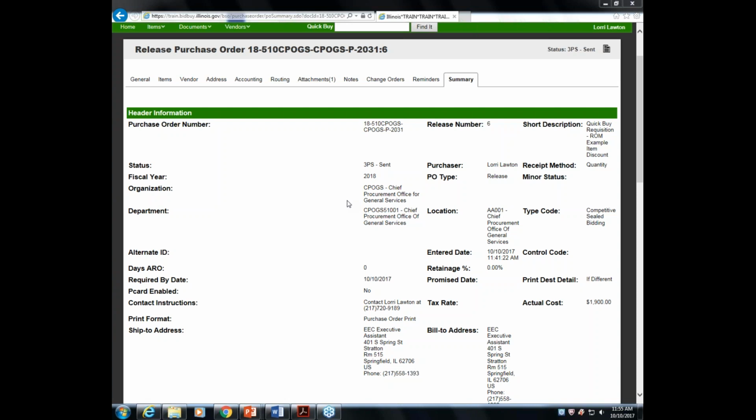And that gets sent over to the comptroller's office for $20,000 and above. In IGPS, you could have done maybe a $5 order and it still obligated it for you. The comptroller's office doesn't require that. It was just part of IGPS functionality. And so really now it's that $20,000 and up, unless for whatever reason you want to obligate things under $20,000.